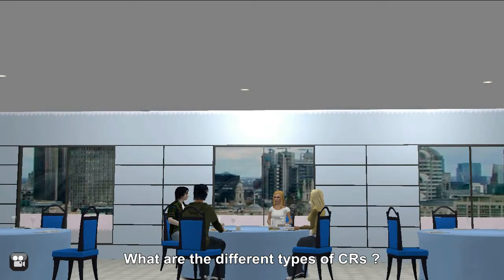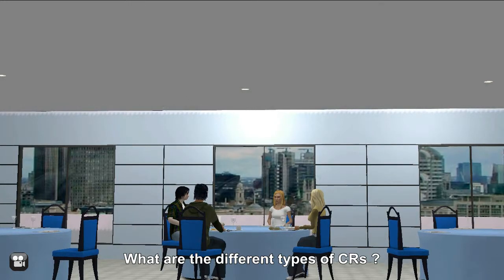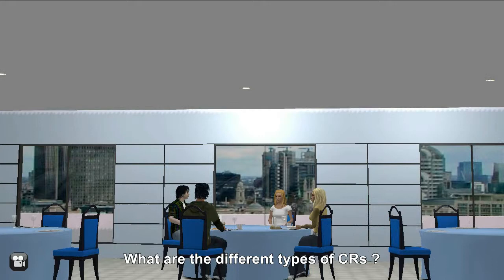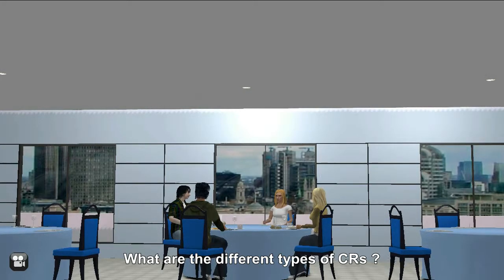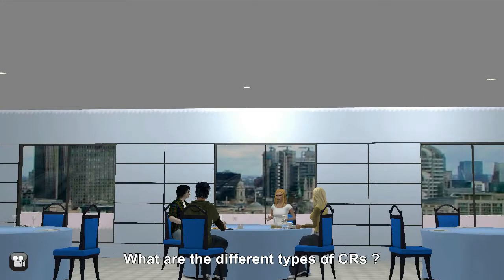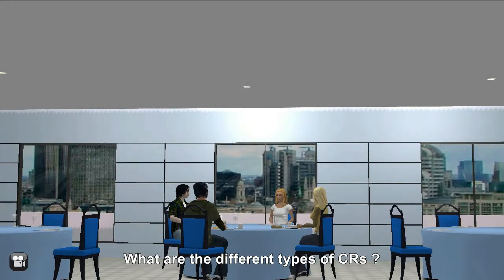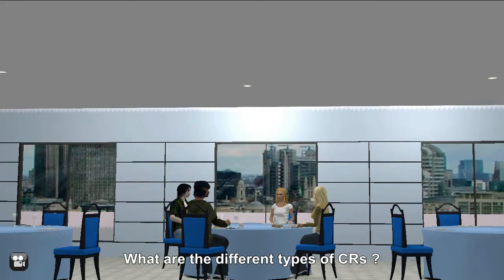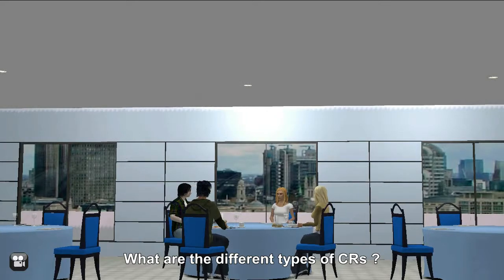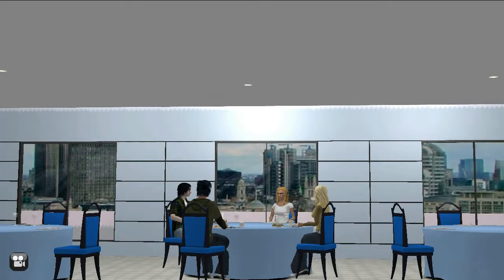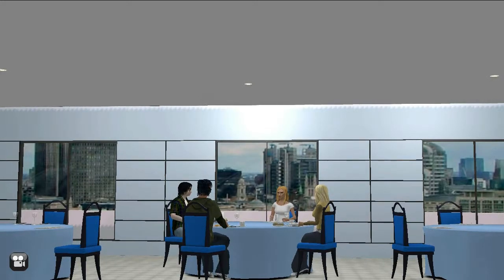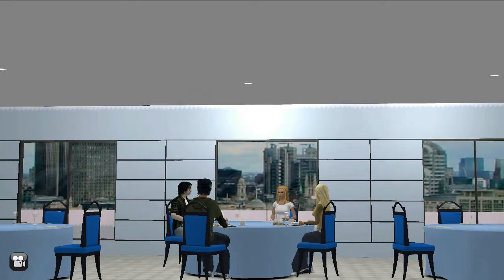An emergency CR, on the other hand, is used when the deployment is to happen within the next 72 hours from the submission date and changes cannot wait for CAB review and approval. These CRs are approved by ECAB or CHIO. ECAB stands for Emergency CAB Members. Finally, a pre-approved CR type is used for changes that have low impact and risk. This CR category does not require CAB or ECAB approval. However, other than CAB approval, pre-approved CRs do require other approvals and completion of tasks in ServiceNow before changes can be deployed.